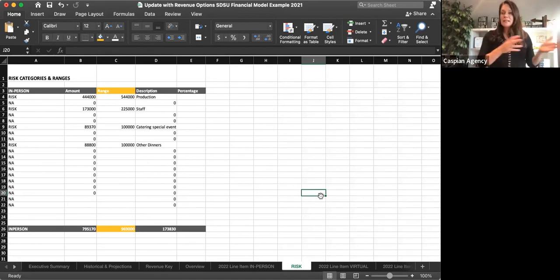So it does take some formula work and setting it all up ahead of time, but you can see how this saves time, and it also makes a compelling argument if you have to argue for more contingency based on risk. So that's just a little extra bonus thing to throw in your toolkit. If you decide to do it manually, that's up to you. I will be asking you in the final presentation to quantify what categories of risk you see and how much additional contingency you would recommend for your client or organization. It makes it easy if you do it like this, but you could stick with manual. So just keep that in mind.